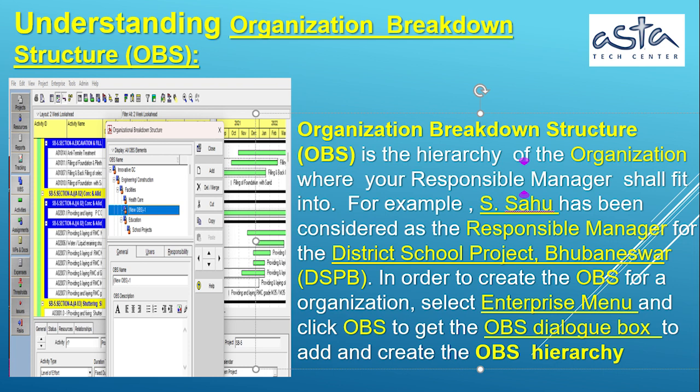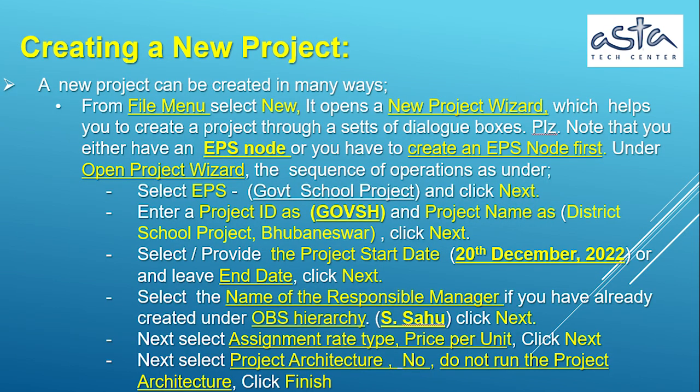In order to create the OBS for an organization, select the Enterprise menu and click OBS from the drop-down list to get the OBS dialog box, and here you add and create the OBS hierarchy. Creating a new project. A new project can be created in many ways.